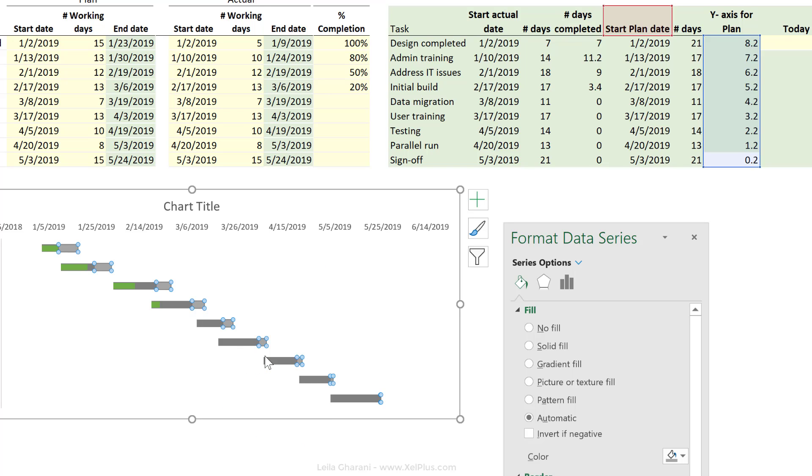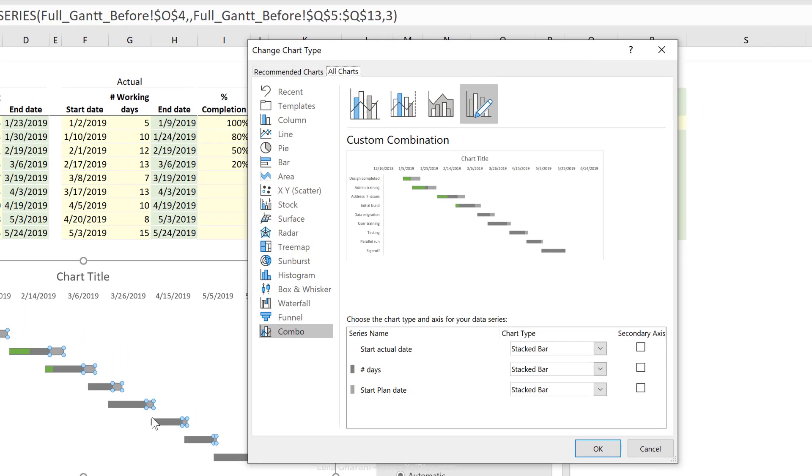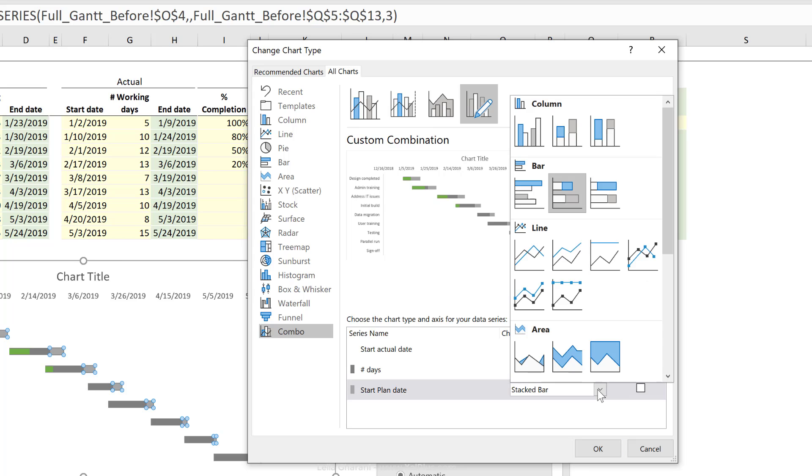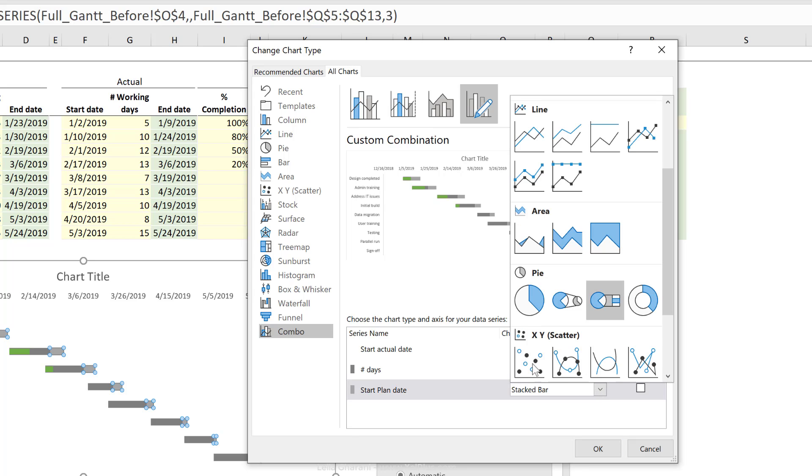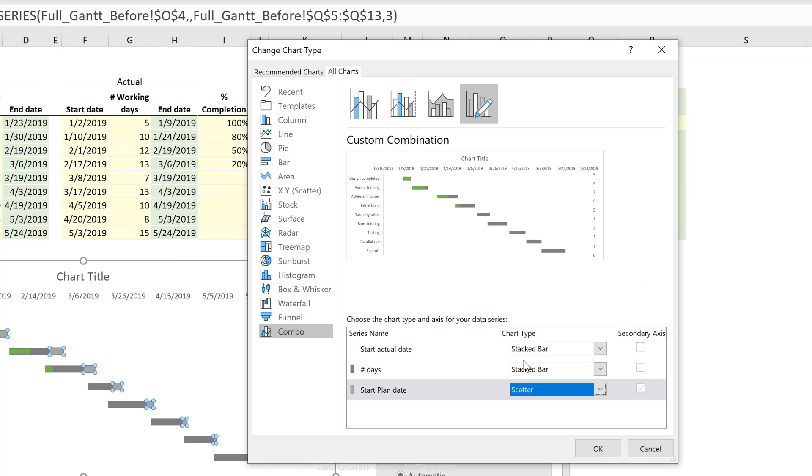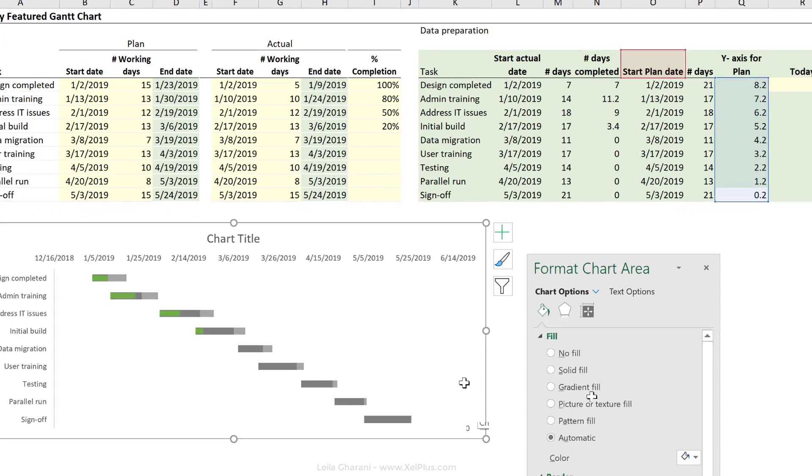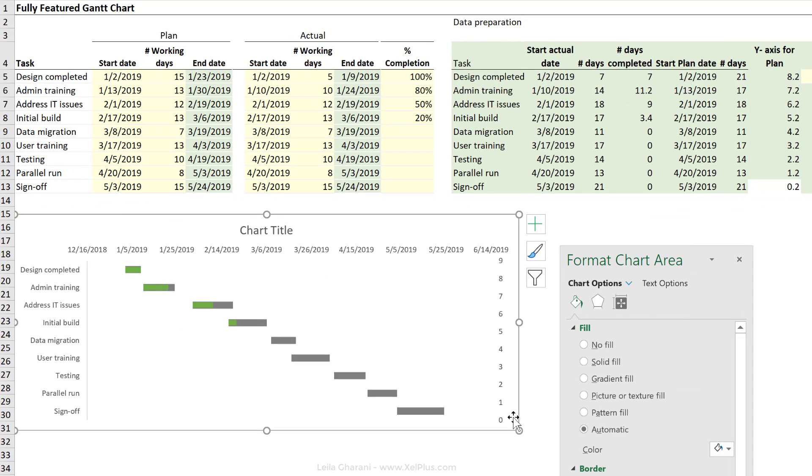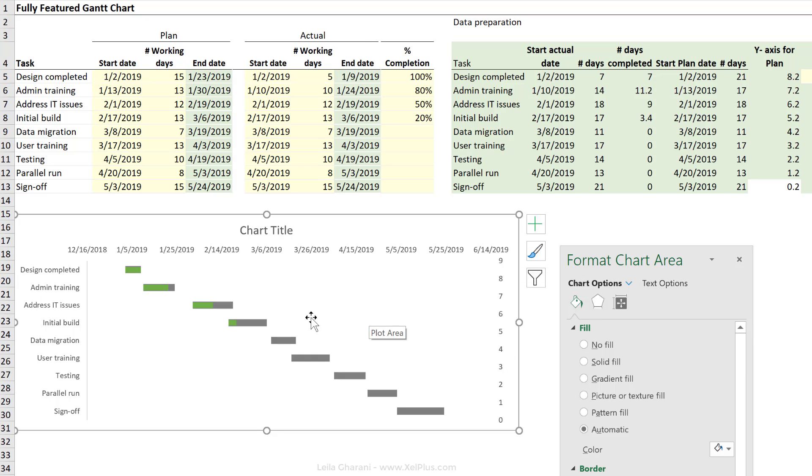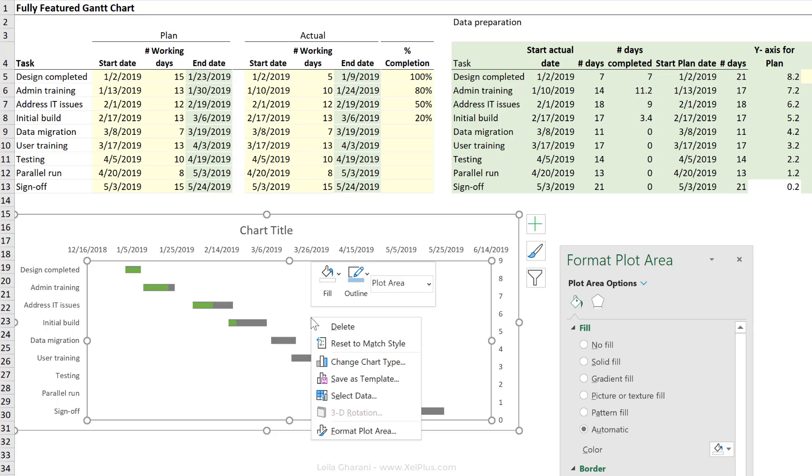So right mouse click, go to change series chart type, stay in the combo view and change the plan date to a scatter plot. Automatically, it's going to activate the secondary axis and gives me automatic zero as minimum and nine as maximum. Where are our dots gone?